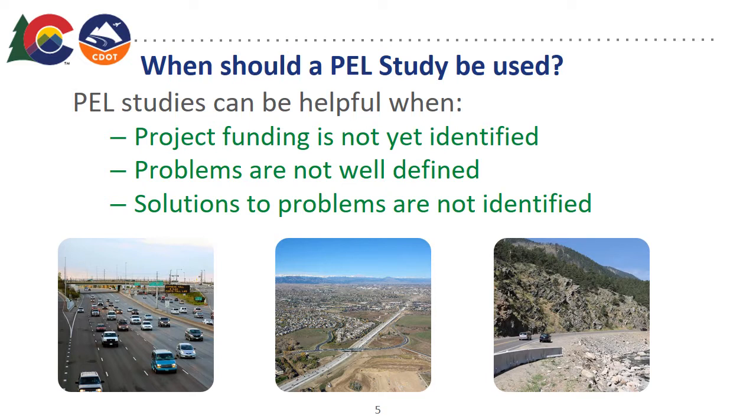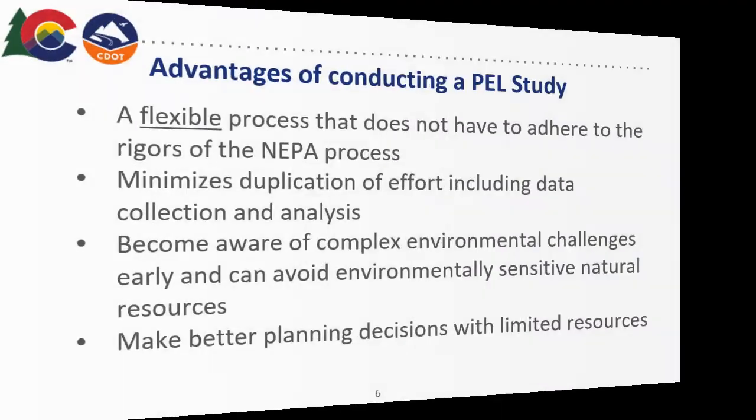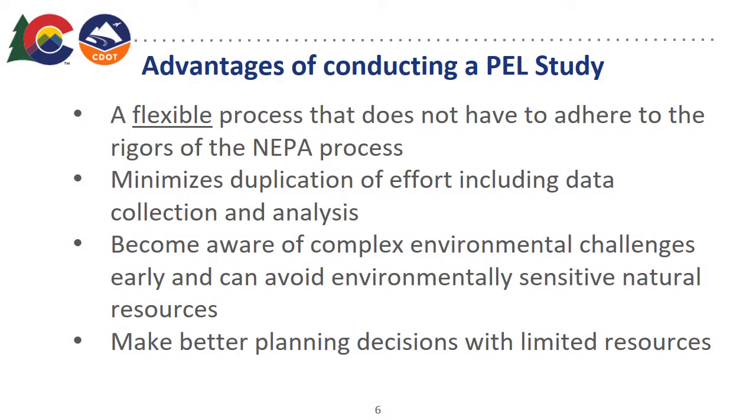When should a PEL study be used? They're most helpful when project funding is not yet identified, when problems are not well defined, and solutions to problems are not identified. And advantages of conducting a PEL study under those circumstances is that it is a flexible process that does not have to adhere to the rigors of the NEPA process.